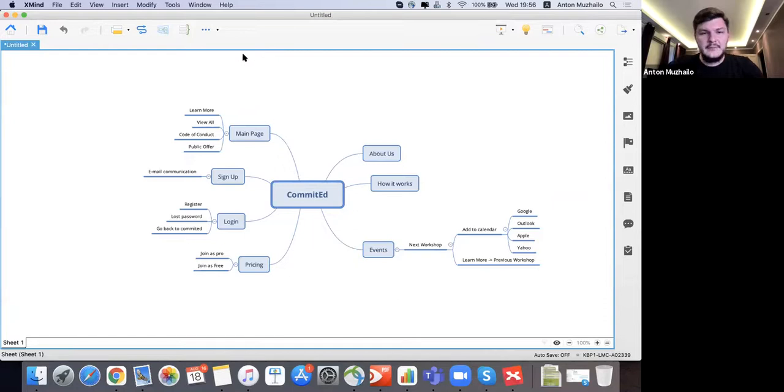Okay, so if you're not typing everything in chat, that's because I broke one of the most important laws in estimation. I will talk about this later in detail, but the general rule is to not share your estimation with other participants before they vote, because you make an impact on their opinion. And if those people trust you, or believe you're an expert in something, they would most likely provide the same estimate as you. And to avoid that, you need to make it anonymous.